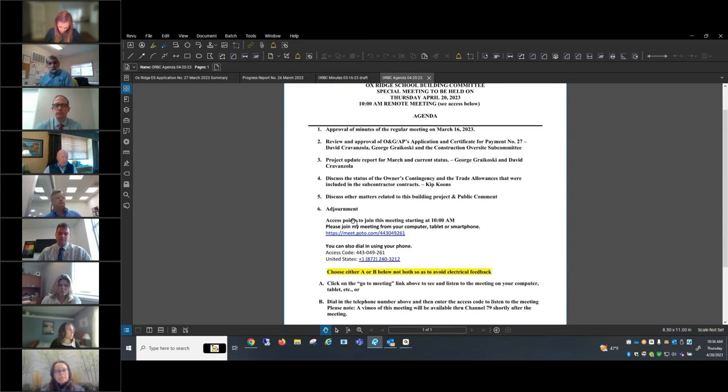For example, probably one of the most outliers of all will be the furniture story. Furniture stories right now, I've got $1,286,000 of purchase orders, stuff that has been delivered and will be delivered. We originally projected $780,000, but we had more students, and so that changed everything. So the question is, where do we really start? And I want to go through that. On the technology side, I know that we're a lot less than we had projected originally because we saved a telephone system. But it's all of these things I want to go through with a finance group and then come back to you with a complete story of where we really are.